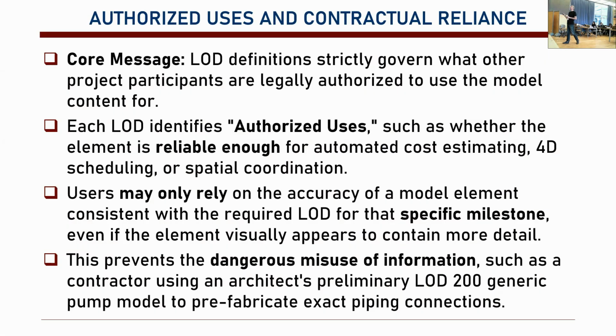And of course, authorized users and contractual reliance. Basically, what can other people use the model for? As I mentioned, a simple representation of the projector can only be used for coordination. But an LOD 400 representation of the projector can be used for construction on the site.